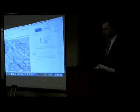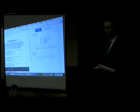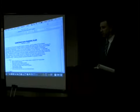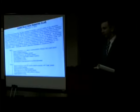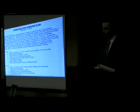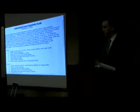But the intent is to do this in several sections to minimize the disturbance and not overtax any storage areas that we've designated, and allow for minimal disruption throughout the project. The phasing plan is also in the contract documents. It will be specific that material removed through the reclamation project is hauled out that same day, aside from some that may be needed for additional base course for walkways or to supplement poor soils that need to be over-excavated in the driveways themselves. So that's a very brief synopsis of the changes that were made to these plans. I'm happy to answer questions as well.